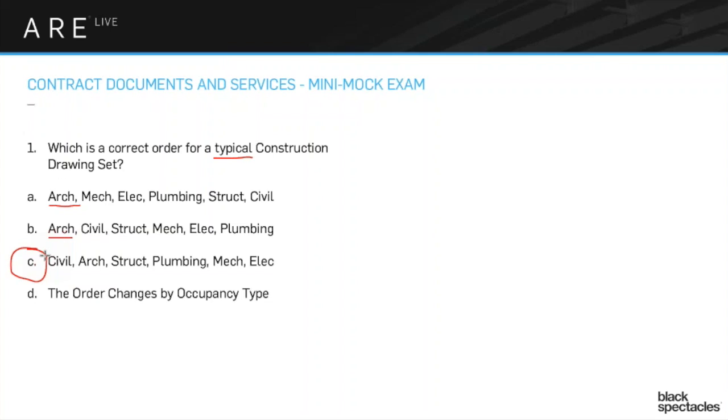One of the things that always throws me off on this is, for years and years, I've always been talking about things as the architecture and then the MEP, the mechanical, electrical, and plumbing, and people generally will talk about it as MEP, but that's not the appropriate actual order. The appropriate actual order would be PME. Some places will do mechanical first and then plumbing. It's an interesting conversation, because always the question is, who goes first in terms of the construction schedule. But the way that most of the guidebooks will tell you, the general preponderance, is that it'll be plumbing, mechanical, and electric, starting with civil, then architecture, and structure always comes right after the architecture.